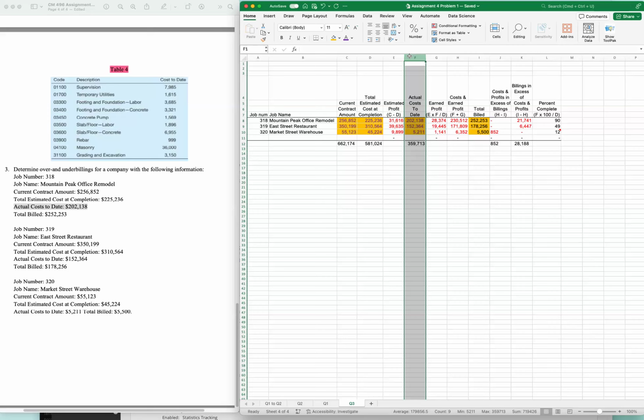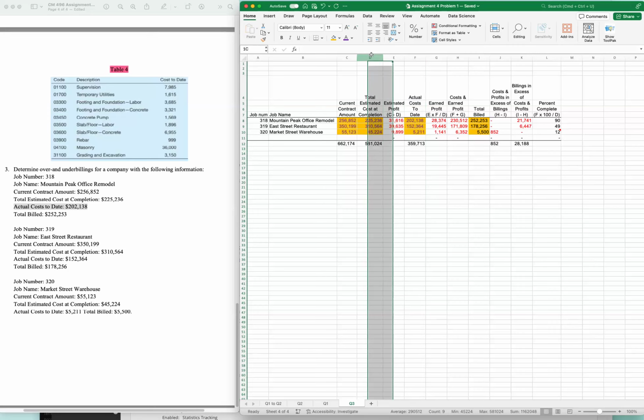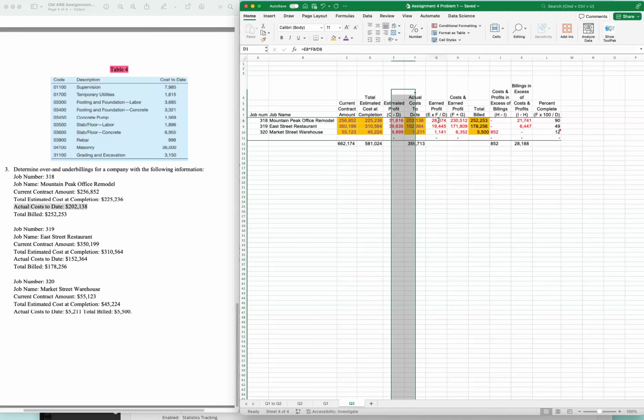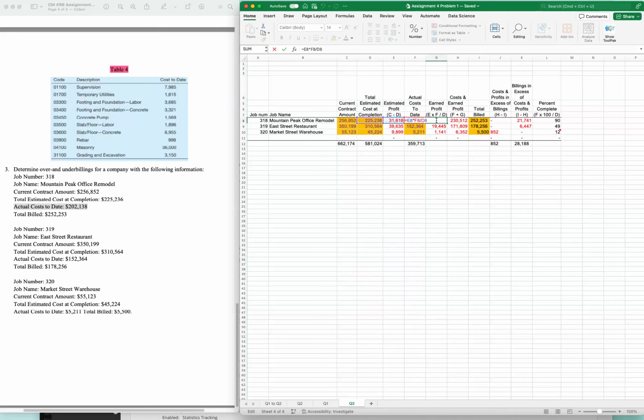So you are using your actual spend to divide by your total estimated spend, right? So in this case it will be E times F and divided by the estimate, right? And you get those three numbers here.